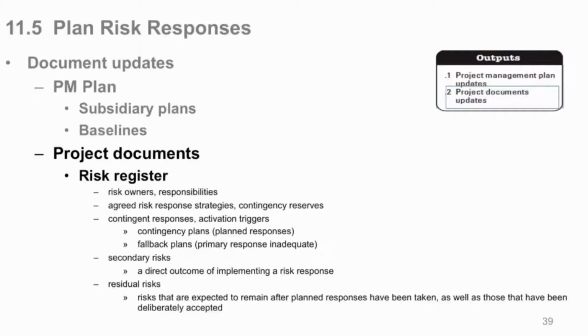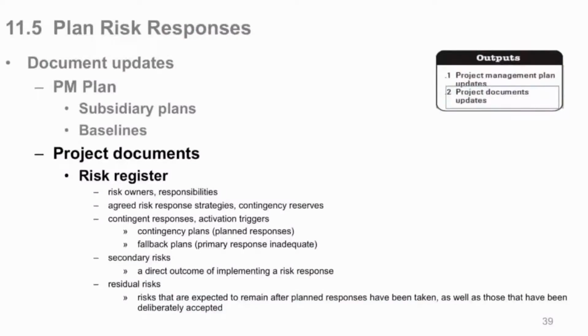Because with your response plan, you may not pay a lot of attention to make sure everything is right all over, because it's an emergency situation, basically. So there are fallout problems, and now you have more risks that you have to identify and deal with in a similar manner after the smoke clears. That's called secondary risk.